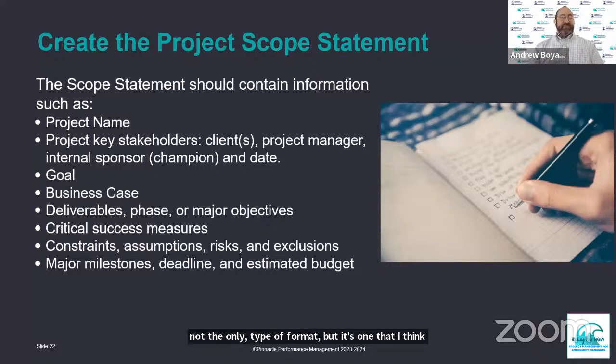What's the project name? Who are the key stakeholders? Client, the project manager, if there's an internal sponsor, and a date that this has been put in place. What's the goal? SMART goals that we talked about. Business case, making sure there's justification for the project. What are the major deliverables, phases, and major objectives?